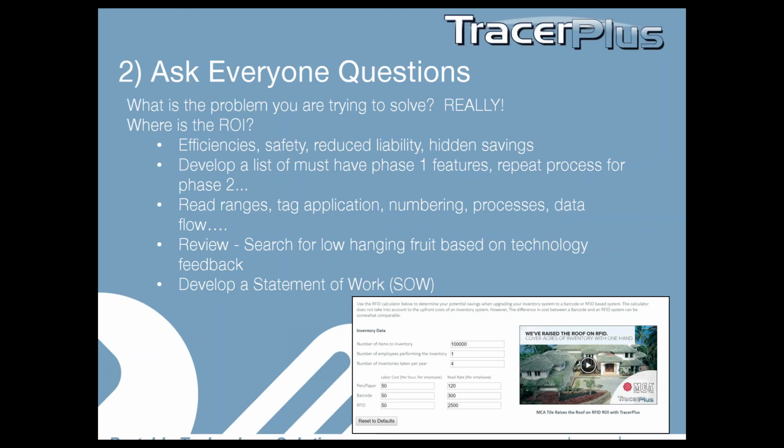We've done installs where we've spent a lot of time, made investments, and they do an ROI analysis at the end of the work. Maybe it's 6 months of work between both companies, thousands of dollars invested by the customer, and they say, we looked at it, and the ROI is not there. We figured out we're only going to save $300 per facility by implementing the technology. Well, the question is, why didn't that take place at the beginning? It would have saved thousands of dollars.